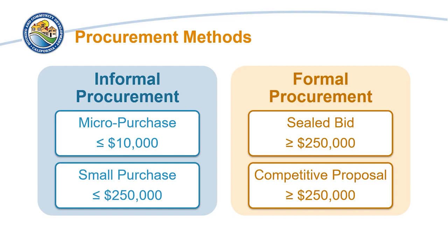Micropurchases can only be used for the procurement of items that do not exceed $10,000 in the aggregate. Small purchases can only be used for the procurement of goods and services that do not exceed $250,000 in the aggregate. Sealed bids and competitive proposals must be used for the procurement of goods and services that exceed $250,000 in the aggregate.